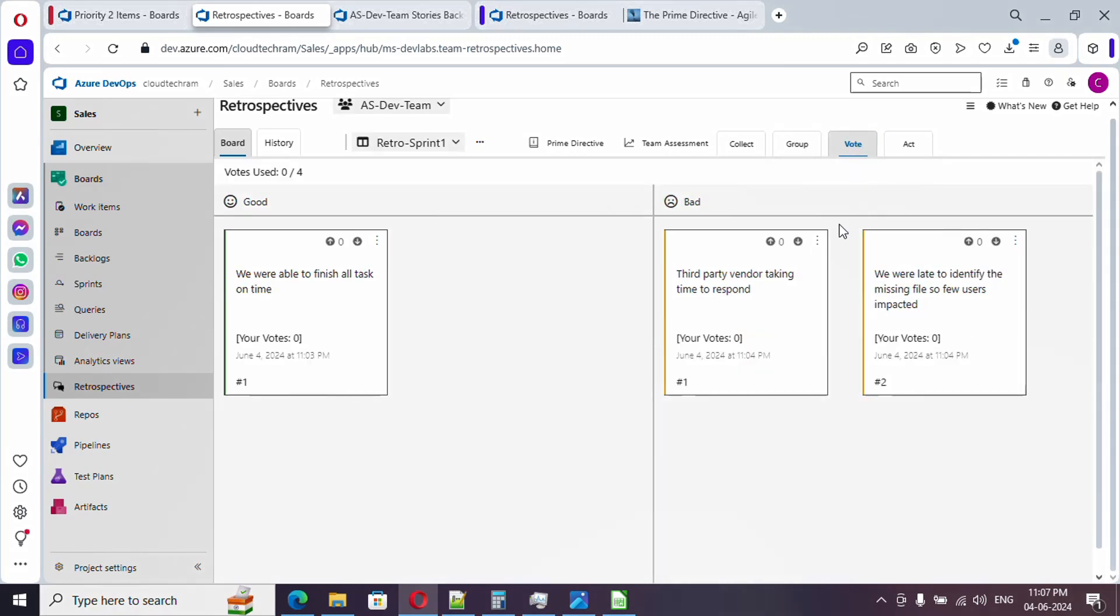We will ask the team members to vote this particular feedback. What is the purpose of voting this? In case if it is having a maximum vote, then it is one of the priority items we need to address. The scrum master will provide two more minutes for voting.